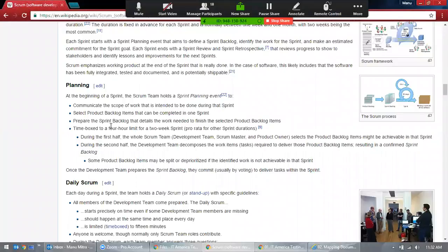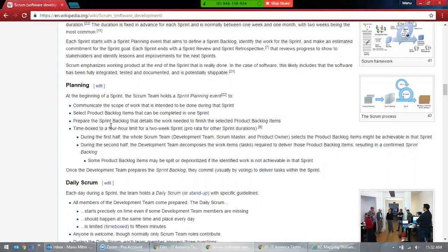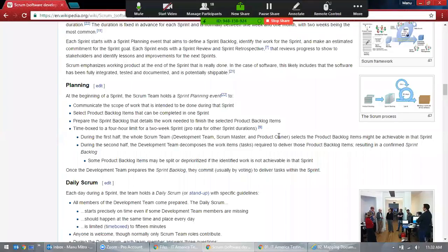Now you have this sprint planning. You want to plan for 30 days, because a sprint is a time period. You need to plan with that: how to do it and what to do. They'll discuss all about the user stories. You have the product backlog, which is divided into the sprint backlog, and that sprint backlog is again divided into user stories. That means you're being more specific.